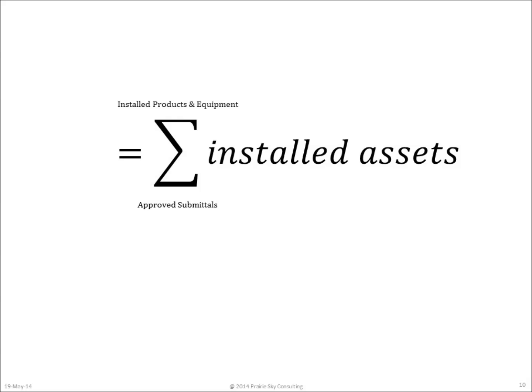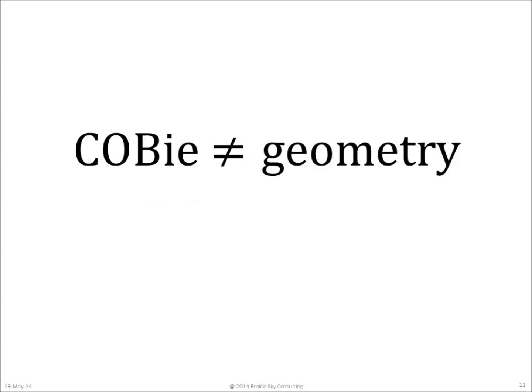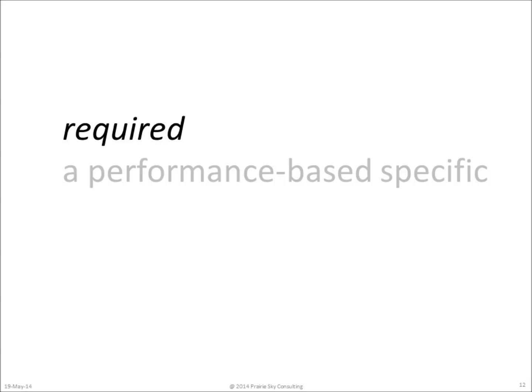It's probably important to note at this point that COBie is about the information content of the assets in the building, the scheduled data and the as-installed information. COBie dataset should not contain complex building geometry. It's not intended for that. It's simply an exchange of the information about building assets.